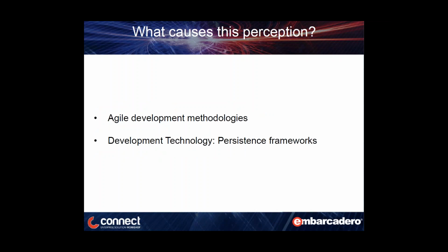So what are some things that cause this particular perception? I think one of the biggest ones that we've seen is the advent of Agile. Agile really came out of the fact that these waterfall projects were taking forever to get to a working piece of software. By the time we got to a working piece of software, the business had changed, requirements had changed, and that 6 to 12 months of development was a complete waste of time.